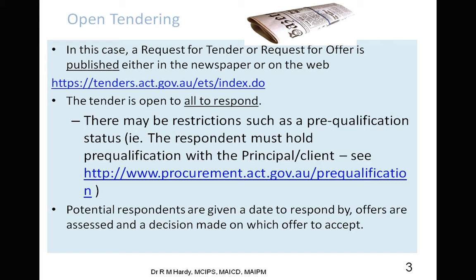The process of doing it is, when you answer a tender, the first thing you need to do is get the tender documents. So you need the drawings and specifications in order to be able to do your costing. Now, before I get into that, the other things they will need in their tender forms would be their building insurance. Generally, these are companies that have a standing arrangement with builders, so they need a letter from that company to say that they will be insured for the construction.